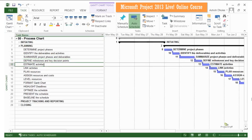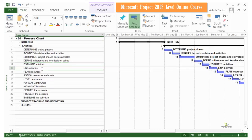We will look at various different ways of entering efforts and the formula used by Microsoft Project behind the scene. We will see the difference between a duration-based estimate and an effort-driven estimate. We will then move to creating dependencies between different activities — how we identify dependency and how we capture it in Microsoft Project 2013. Creating dependencies is one of the best practices. I am also going to show you how to review whether you have captured all dependencies, checking their correctness and completeness. We will also look at how to capture leads and lags — leads will accelerate your task whereas lags will provide a pause between two tasks.